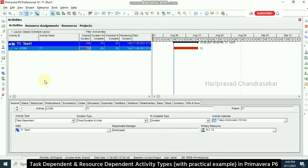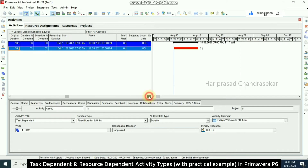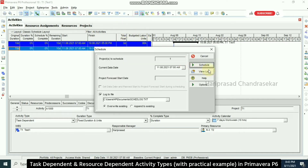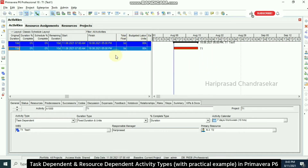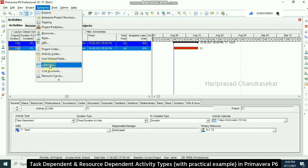I found a problem in this project — we have an input of 10 days but the finish date shows only 8 days. It starts on the 11th and ends on the 18th, which is only 8 days, and it's showing only 80 hours. Going to Schedule doesn't change it, so there must be an error — I'm going to Enterprise and then Calendar.